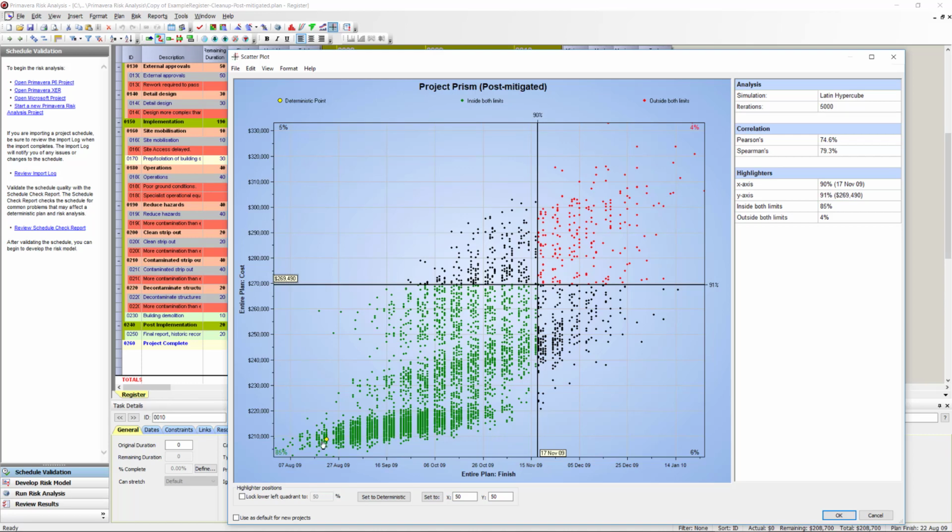You remember the contract was signed with almost $209,000. But we can see from here that, for you to have a level of confidence of 90% to meet the cost, you have to specify that it will cost $269,000. So you can make the comparison.